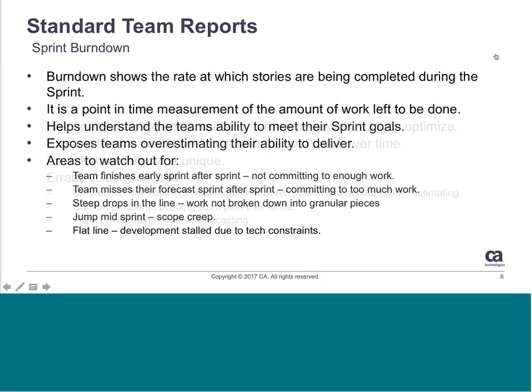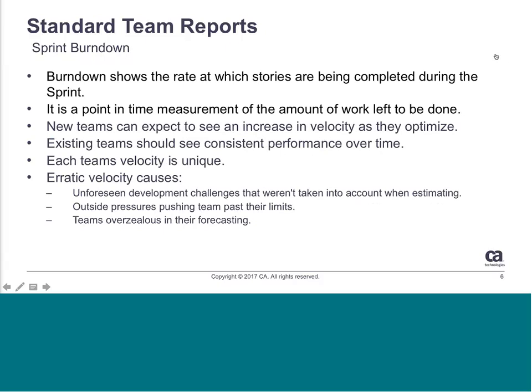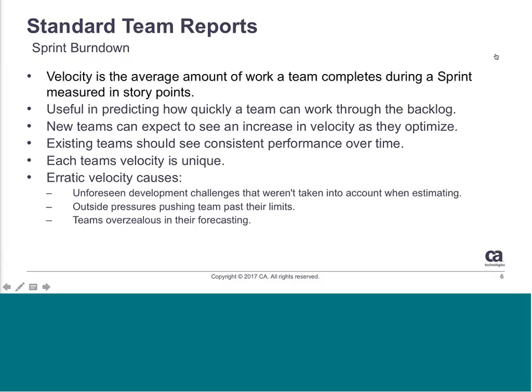I mean, ideally, once the team is committed to an amount of work for a sprint, they really shouldn't have a huge turnover of work. They should be let alone to complete that commitment, and if there needs to be change, new priorities and such, then that should come in at the next sprint. It really shouldn't jump in the middle of the sprint.